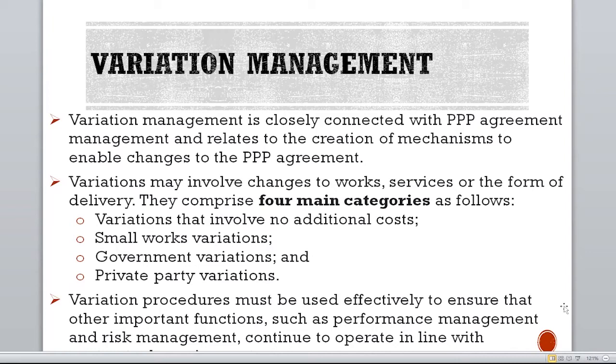So all those variations need to be taken into account, as this might have added additional costs. When the government makes such a policy, it makes screening processes at the border tighter, and maybe that means more delays, meaning that what would have entered in maybe 2 days now takes 5 days. All those small things sound like contingency planning, but it's not in this case; it's more of a mutual understanding that this is likely to happen.